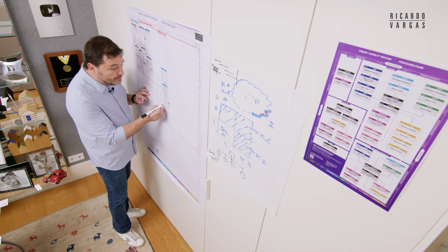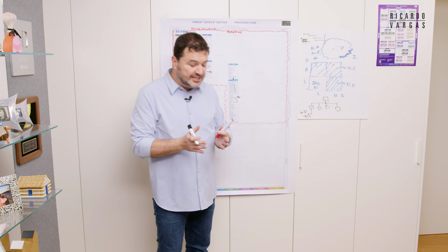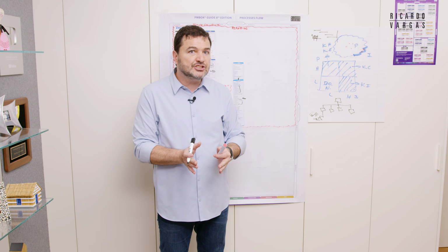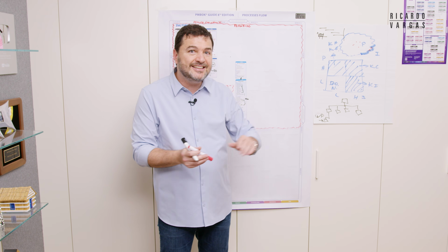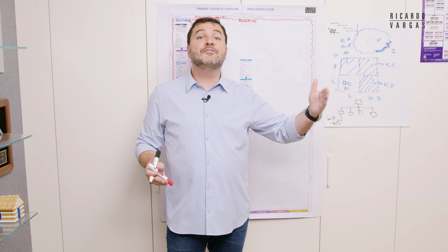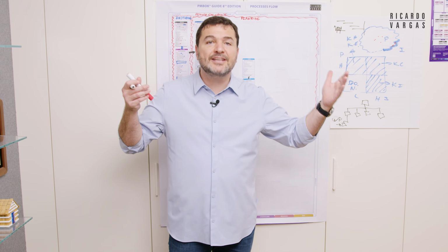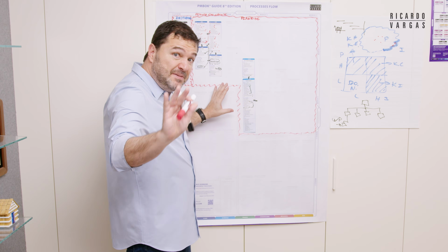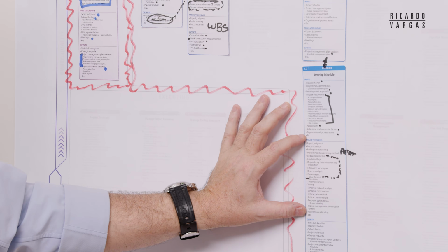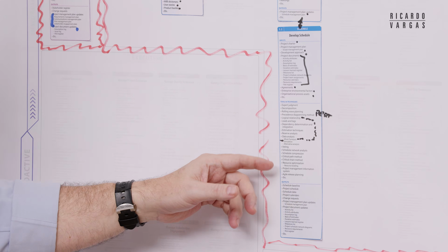Then I use simulation. I can use Monte Carlo simulation, for example, using optimistic duration, most likely duration, and pessimistic duration. And then I have a bell curve saying there is 95% probability that I will finish this project before that time. And let me stop here. These techniques, I'm not saying you need to use all of them. These are the most common you need to do, okay?